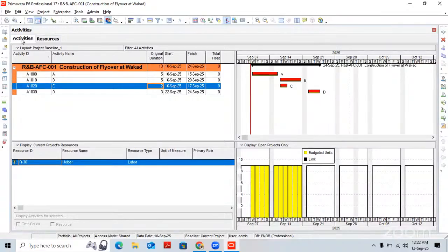If you are talking about multiple projects, then there is one software, EPPM. In EPPM, we come to know about over allocation and how many resources we are utilizing, and there we have a provision. If we have excess resources, wherever we require resources, we can transfer them to that place through the use of the EPPM software. The concept is the same. Now you can do it another way.